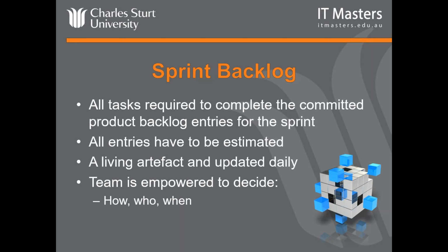Thank you. A question from Anoop. How does the Scrum Manager manage the moving goalposts under pressure from the product owner? I'm going to talk about that with adaptive planning. But basically, we embrace change, but they can't just change it at any moment in time. Once we're in the sprint, we don't change. They're allowed to change for the next sprint.